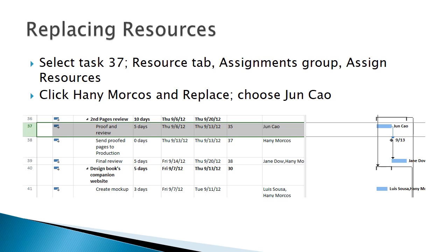In addition, if you check the amount of work, 40 hours, we should expect to complete a day sooner since Jun is a 4x10 employee. This version of the project isn't reflecting that, however the difference isn't large enough to be concerned about. Be sure to clear the filter and close the assignments dialog box.